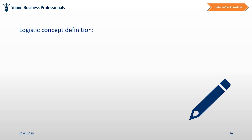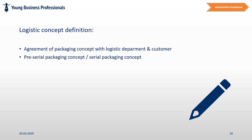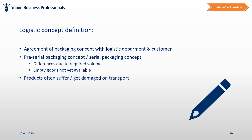Logistic concept definition. Due to the fact that during the time at which the production equipment is in preparation it is required to supply pre-serial demands of specific part levels to the customer, it is recommended and often mandatory to create a packaging concept. This should be agreed between the logistic department of supplier and customer. In some cases the packaging concept for pre-serial production differs from the one for serial production, as volumes are lower and empty goods management may not yet be available. It makes sense to perform packaging trials as early as possible, as complex products might be damaged during transport or similar.